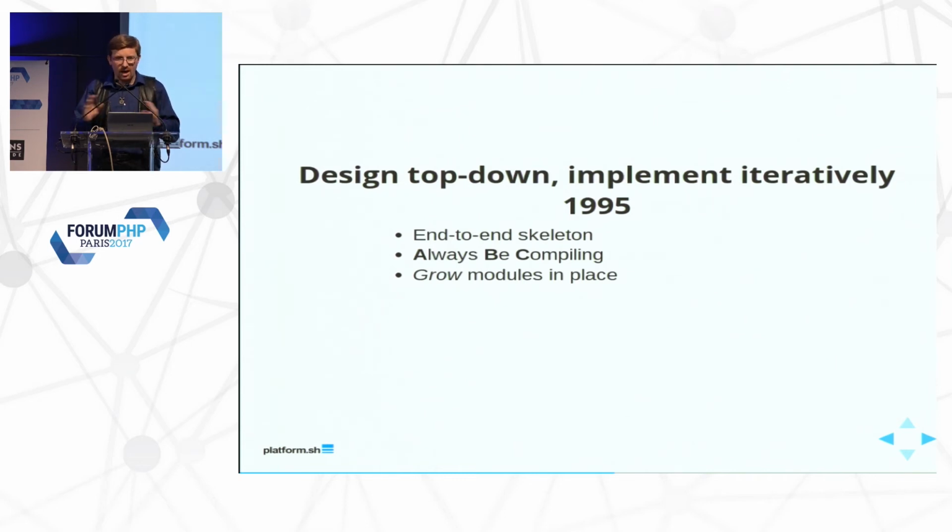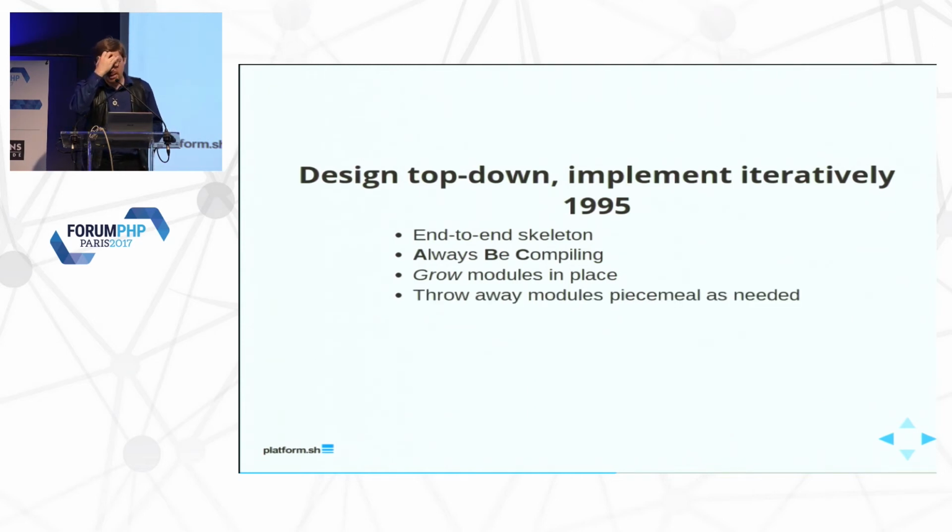It's not, you know, a one-week job or a one-day job. It's not just installing Symfony or Laravel and you're done. That's not the skeleton. The skeleton is what your entire big picture is supposed to look like. This could take a while, but it lets you iteratively add real functionality rather than stubbed out fake functionality, and lets you refactor individual pieces. It lets you throw away modules one at a time rather than the whole system at once.